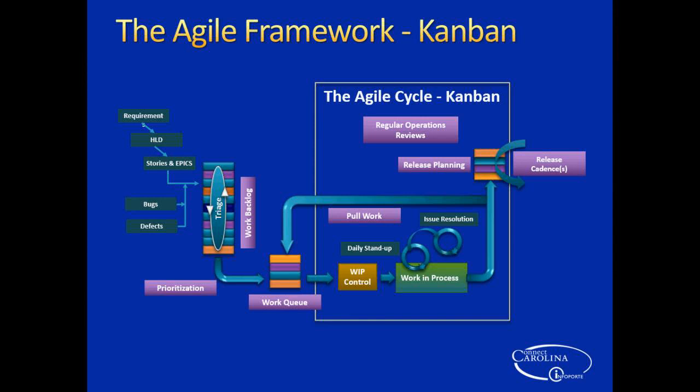Now, when they start changing at this level, you could probably start thinking, now this is looking like scope creep. As opposed to when I'm down in here and we're refining, changing some of the details, at the story or epic level, because we've gained an increased understanding of what it really means to deliver this. Fair enough?